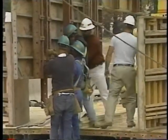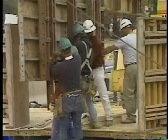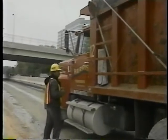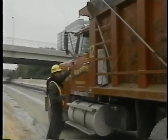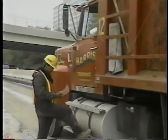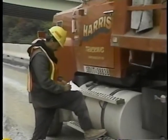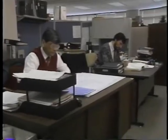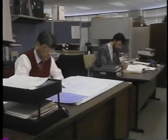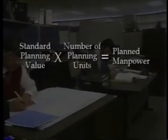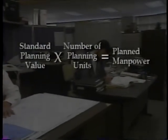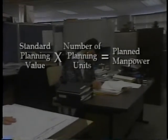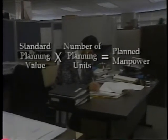Manpower is planned by activity or activity group for each contract or program. Planned manpower may be computed in terms of man-hours or man-months. Regardless of planning method, the basic computation is: standard planning value times number of planning units equals planned manpower.